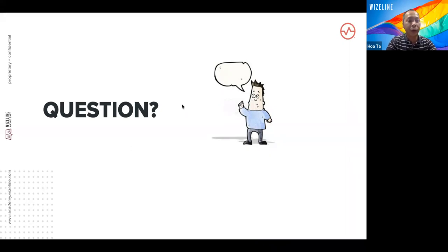How much time should we and can we allocate on unknown situations? So the unknown situation, like I shared, we don't know what we don't know. The unknown situation is something we don't expect, and we never know it happened. So how much time we allocate depends much on historical data, with the organization, with the performance of the team, and sometimes when we do more, we understand how many percent we should allocate to that. With a younger team, with a new organization, the buffer is much higher.